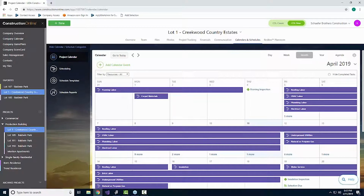Yeah, and when we were talking, Holly, you mentioned earlier that a lot of these companies have very thin profit margins, like a 2% to a 5% number. Well, if you think about it, if it's a $1 million company, $20,000, that is 2%. There's your, that's it right there. That $20,000 is your profit target.